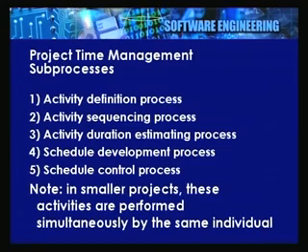So, the activity definition process sometimes may result in causing changes to the work breakdown structure. For instance, if you were to identify a missing deliverable in this particular process of relook, you may have to go back and make changes to the work breakdown structure.